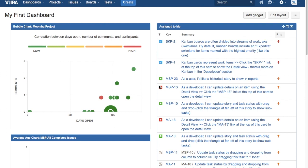Because epic cannot be done within a sprint, it can span multiple sprints. That means you need to keep an eye on the epic and see how the issues within that epic are progressing. That's the key reason to use the Epic Report within your Jira project.